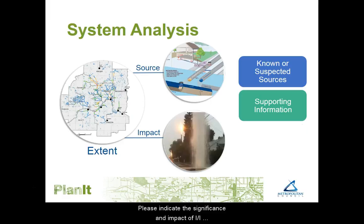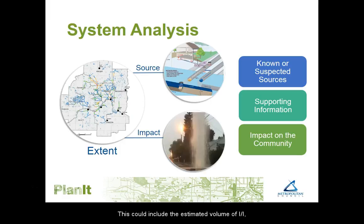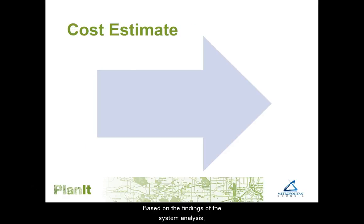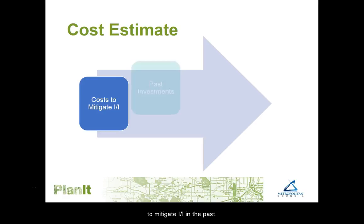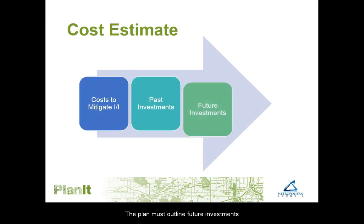Please indicate the significance and impact of I&I on the community. This could include the estimated volume of I&I, past or future effects on public health, or the limitations on future growth. Based on the findings of the system analysis, please provide a cost estimate to mitigate I&I sources. Many communities have completed projects and programs to mitigate I&I in the past, and the plan must outline future investments that the community intends to complete.